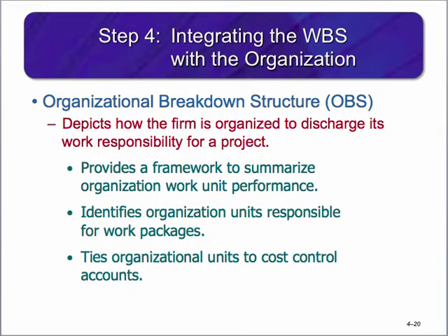The work breakdown structure links to the organizational units who will be performing the work. The outcome of this process is the organizational breakdown structure. The organizational breakdown structure provides a framework to summarize organization work unit performance, identifies organization units responsible for work packages, and ties the organizational units to cost control accounts.